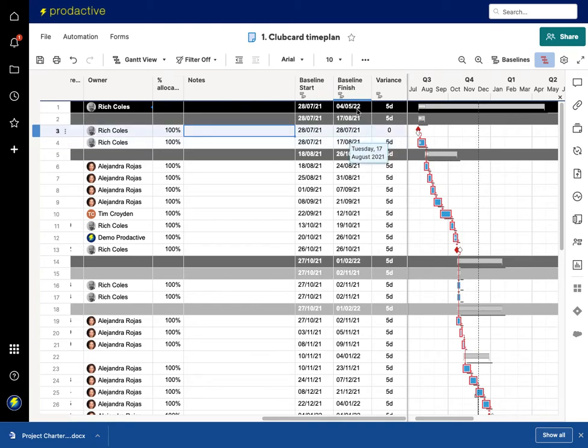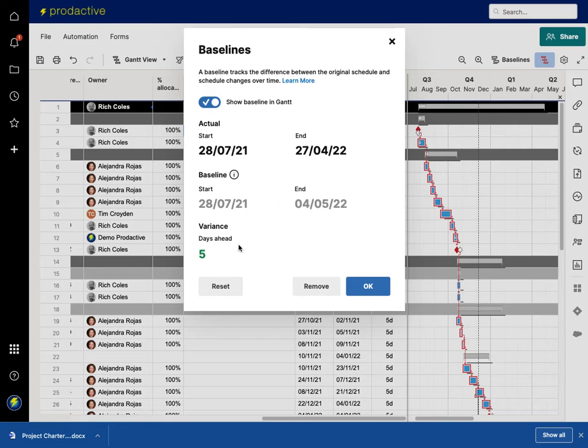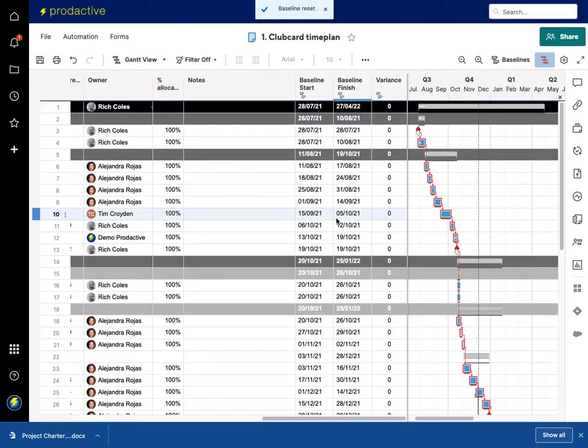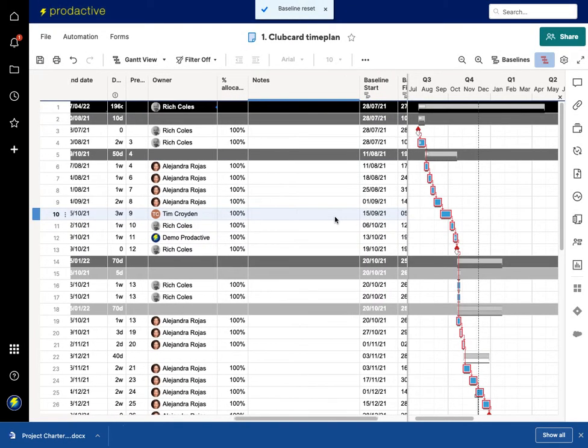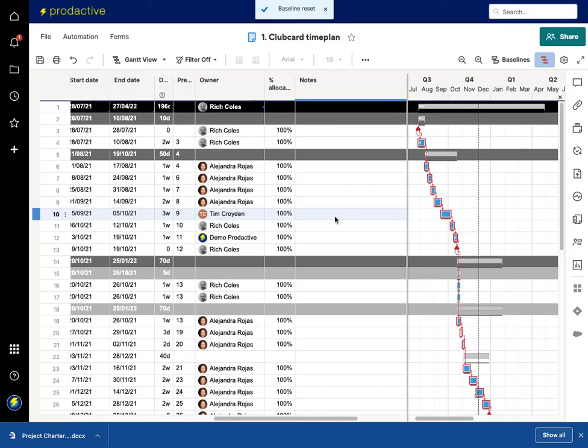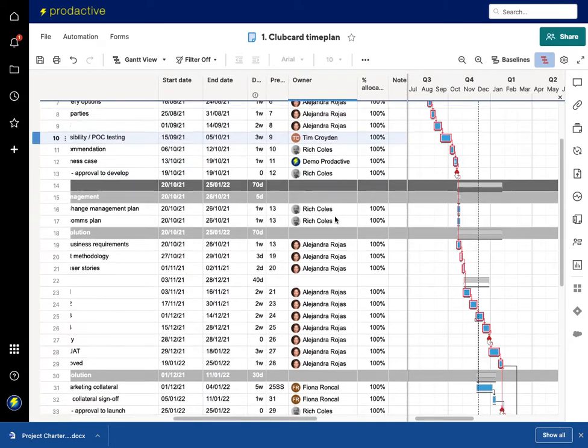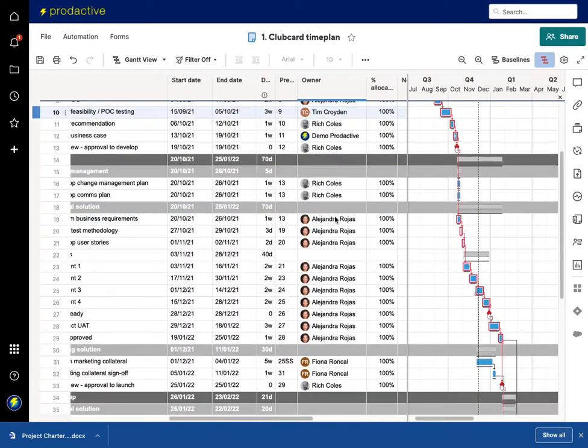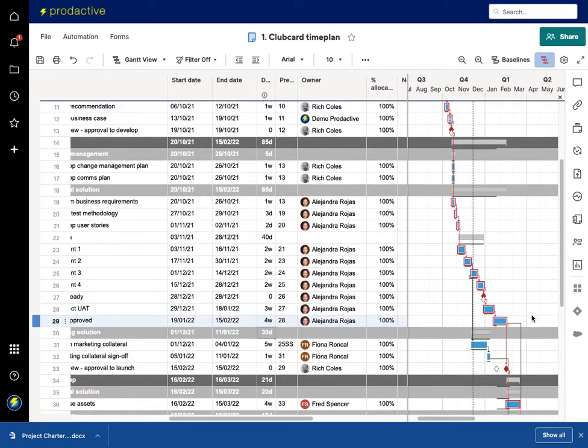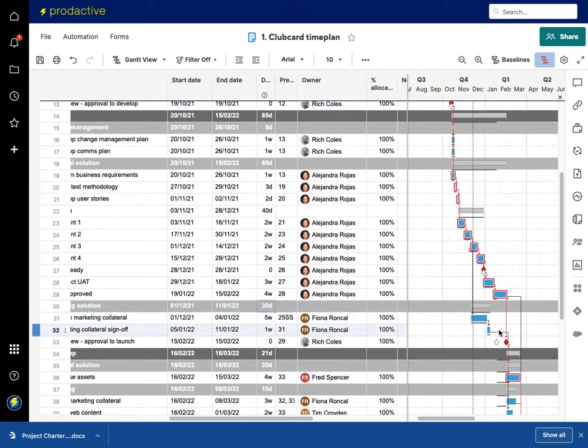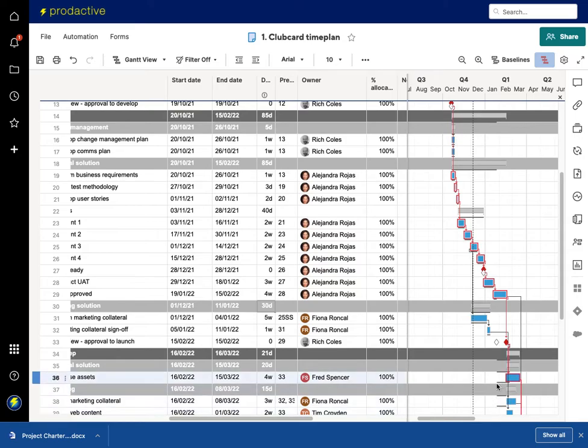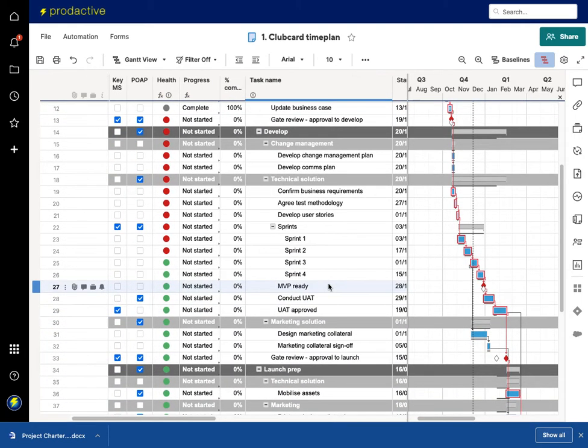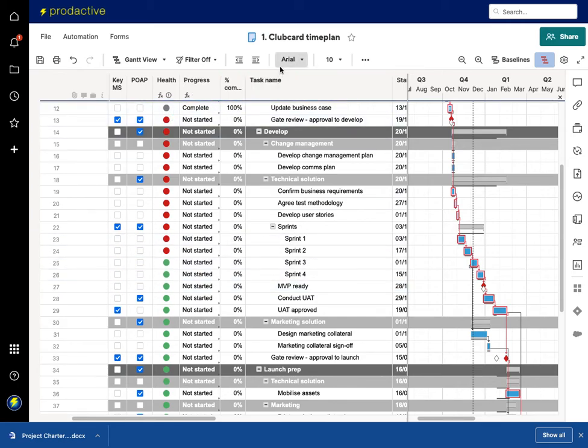You can also set a baseline. In this case if I click on baseline, the baseline is five days ahead. I'm going to reset the baseline and that will change and match the end dates. The baseline has been reset. If I was to now push out a date, for example, and change something lower down the plan to say this is now going to be four weeks, what you can see is down below the impact of that is you can see the dates where they previously were set and they have now moved out as well.